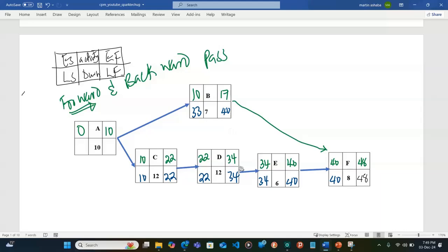Okay, so that's good. And then obviously A is a predecessor of B and C. That's why you have to first finish A before this and that. But now, when we are doing the backward pass, to get the latest finish time for this activity, we take the minimum of the two values, the latest start time for this and for that.